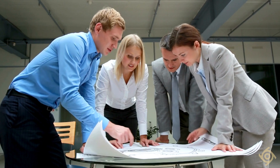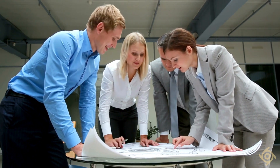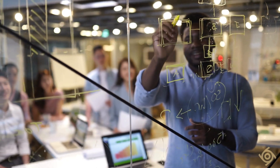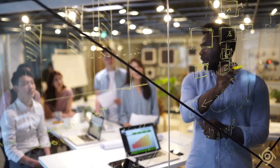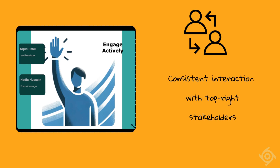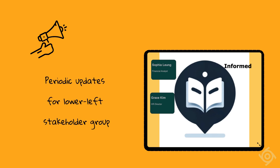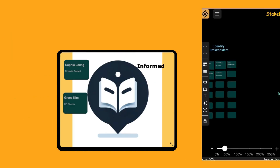Depending on the nature of the project and your organizational context, you may then determine how to place your identified stakeholders into these classifications and how to engage and communicate with each group. For example, you might want to engage actively with the stakeholders in the right top quadrant daily, while you might just communicate occasionally with the stakeholder group in the left bottom to just keep them informed.